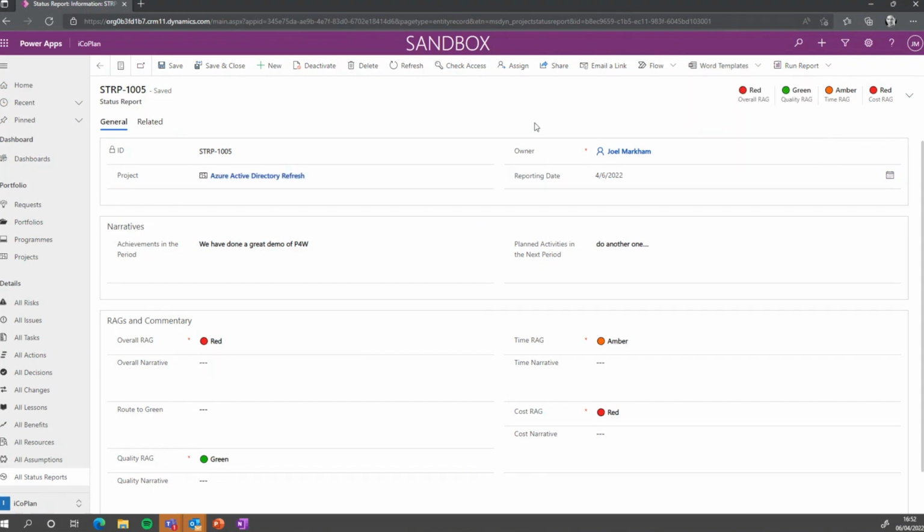You could download it into PDF, and you could send it to your stakeholders automatically. For example, upon PMO approving it, maybe before 10 o'clock on the Friday, Power Automate would come along, PDF it, and send it out to all the project stakeholders in a nice pack for them. All right, so that's the power of the Power App around the outside.